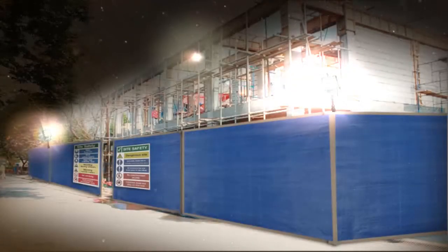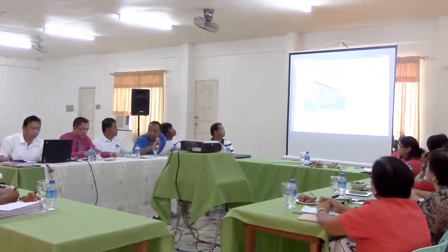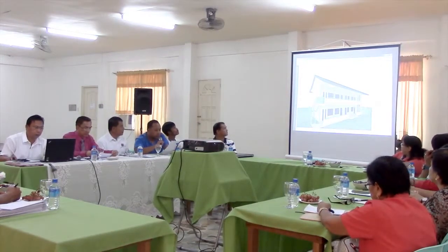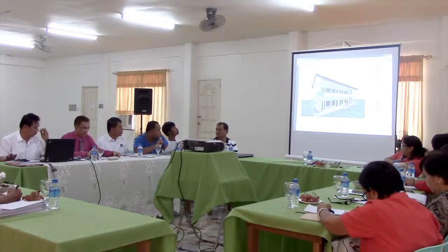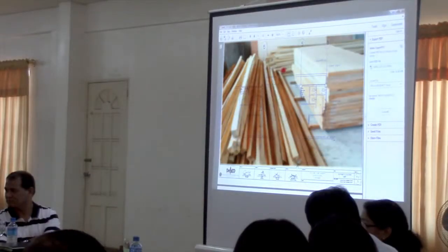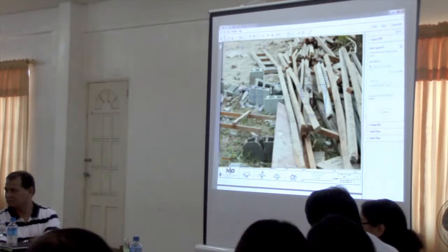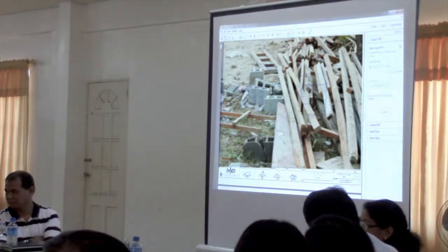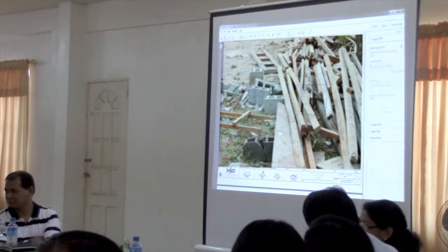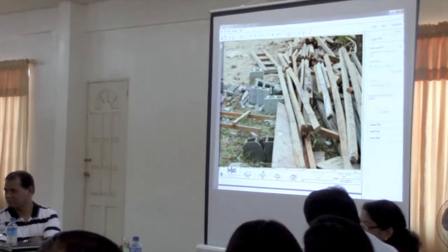The construction site must be well lit and there should be no activities on site that might be a cause of exploitation of women. The principal should also attend the sample materials inspection meeting of the DepEd engineer and the contractor. During this meeting, the principal will be able to see samples of the approved components and materials which are to be used in the construction. This will help the principal in recording observations when any suspected substandard materials are delivered or are being used.